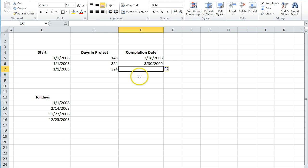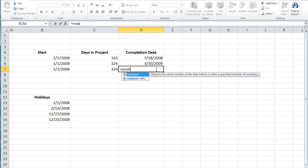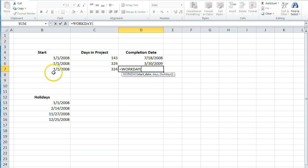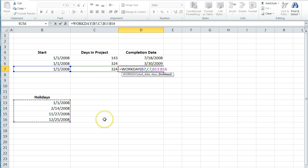If you want to be even more accurate, you'd have a list of all your holidays. And you would do the same formula, workday, enter in your start date, the number of days. Then you'll also just drag through your list of holidays.